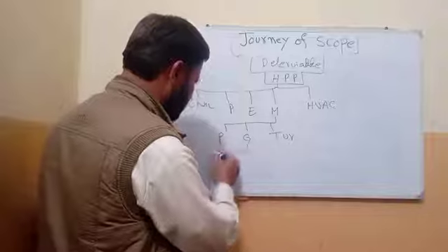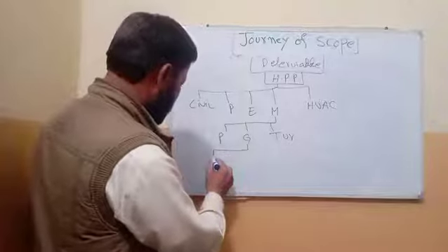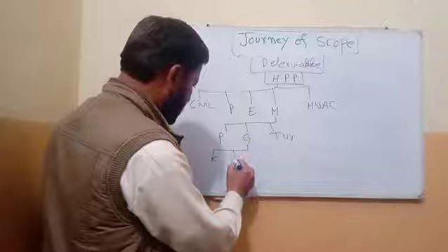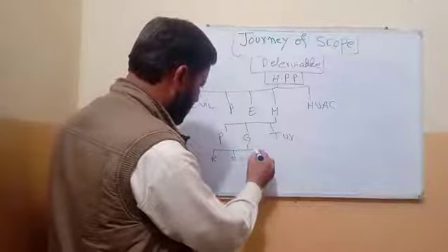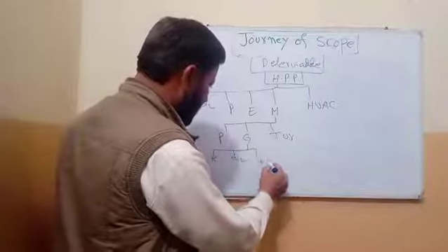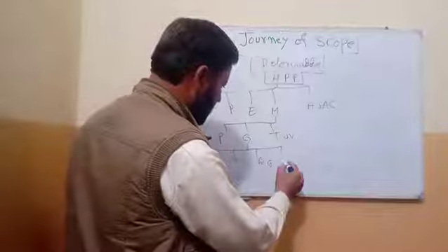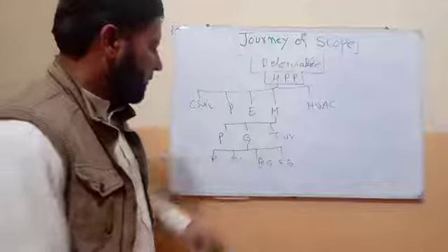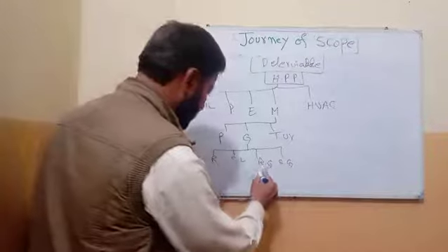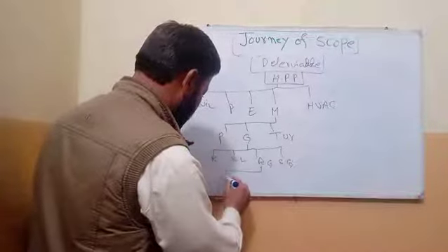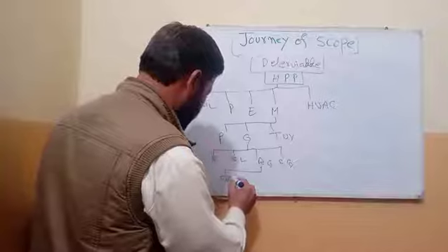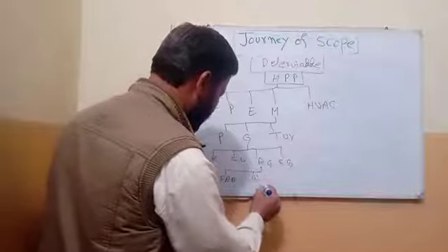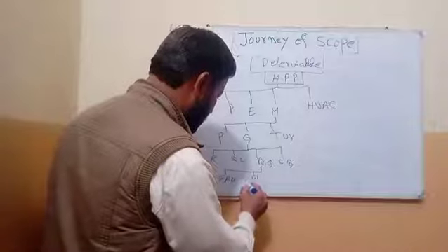Decompose further. Gates: radial gates, stop log, roller gate, slide gate, like that. Then further I will decompose the radial gate into fabrication, welding, and then I will decompose welding more.